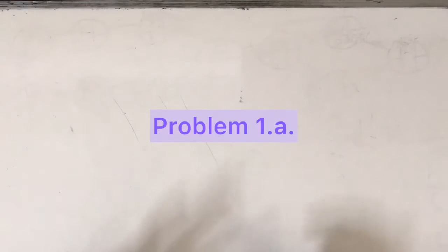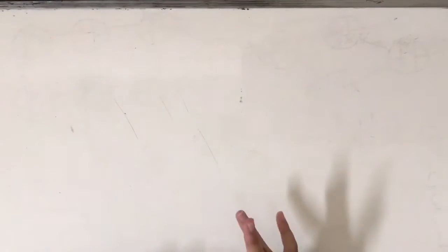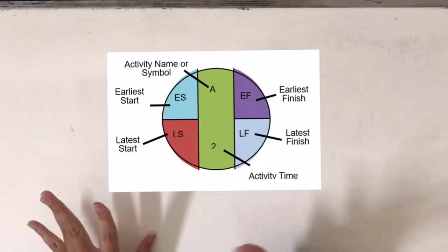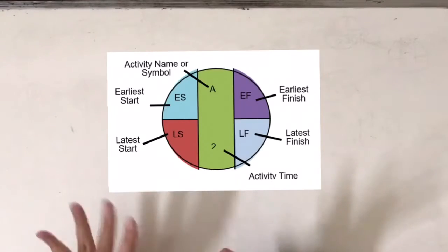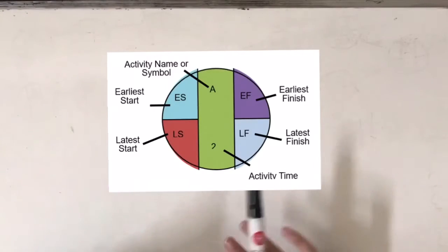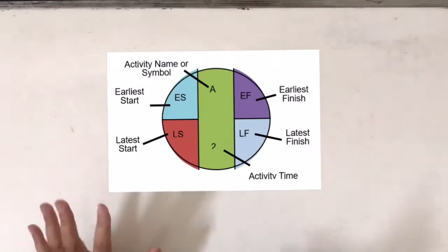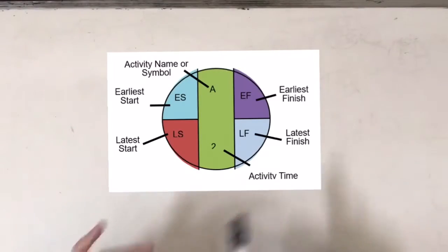Okay, so basically it's similar to the network of activities that we drew in the layout tutorial session two weeks ago. We put each activity based on the predecessor info we have in the table. And remember, in project management, if we want to make the network design to determine the project schedule, we have to use this activity format for each activity. In this circle, we have the name of the activity, time, earliest start, earliest finish, latest start, and latest finish. Each element will be explained later.